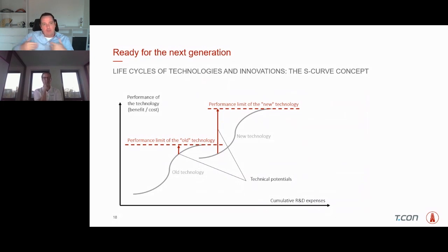They have tested 100 test cases, but then they sit there and what has been just a test is now becoming reality. And there is the performance of the organization. The organization itself is dropped. So you will be lower when you go live with the performance than you have been before. But the major point from my perspective there is you need to be able to get back to the performance level which you have achieved before as quickly as possible.